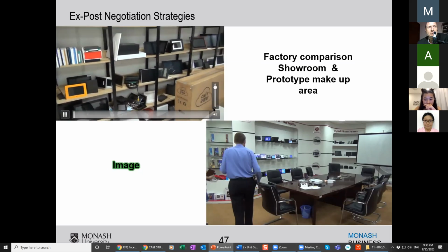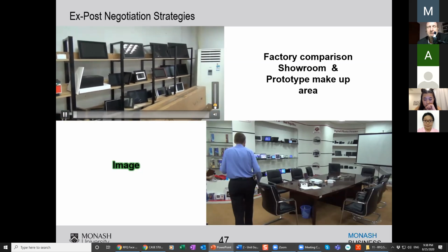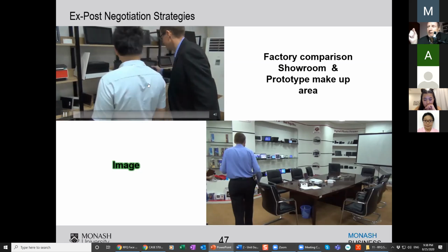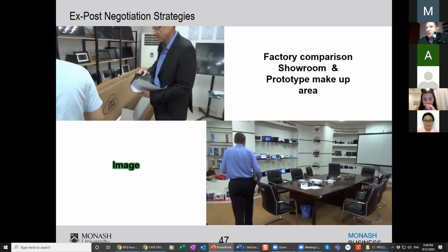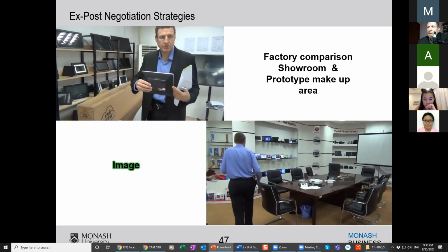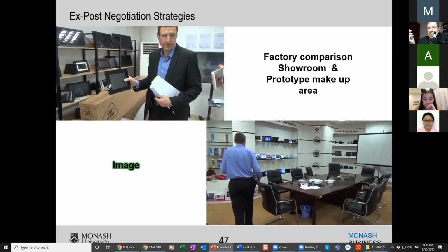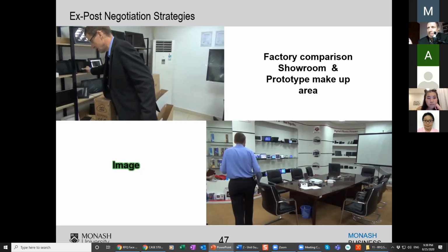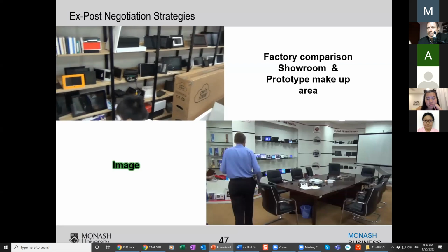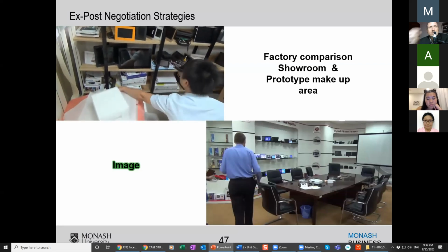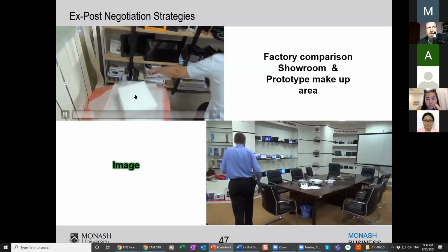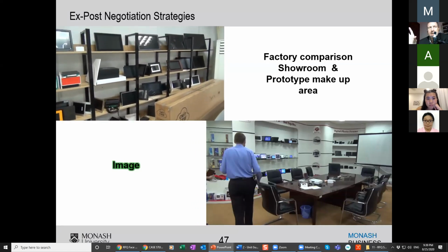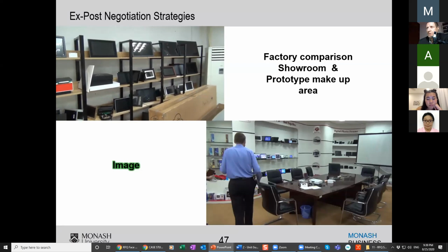What I did was go back to the first supplier and do $20 US FOB for their price. But why don't you invest? You're ordering 2,000 units every 2 months. So why don't you invest, say, half a US dollar per unit in third-party inspection? Normally you send a third-party inspector to this factory. It's $299 for 1 day.